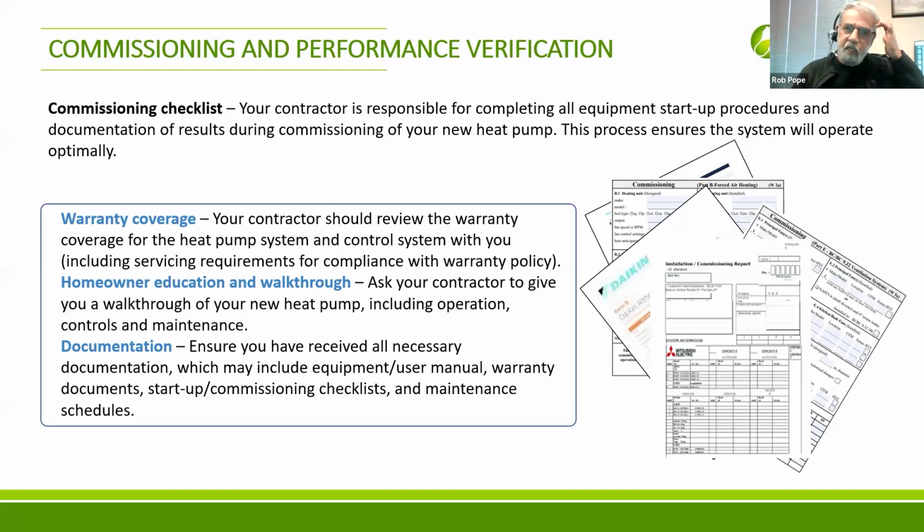You've got to do the shakedown of the system, just in case there is a potential warranty issue. The component arrived from the supplier, you put it in, and it doesn't work. Now you've got to take it back. Get that sorted out in commissioning. Don't wait for the homeowner to discover it later, on a cold night in the middle of winter on a Sunday evening. You don't want that to happen.